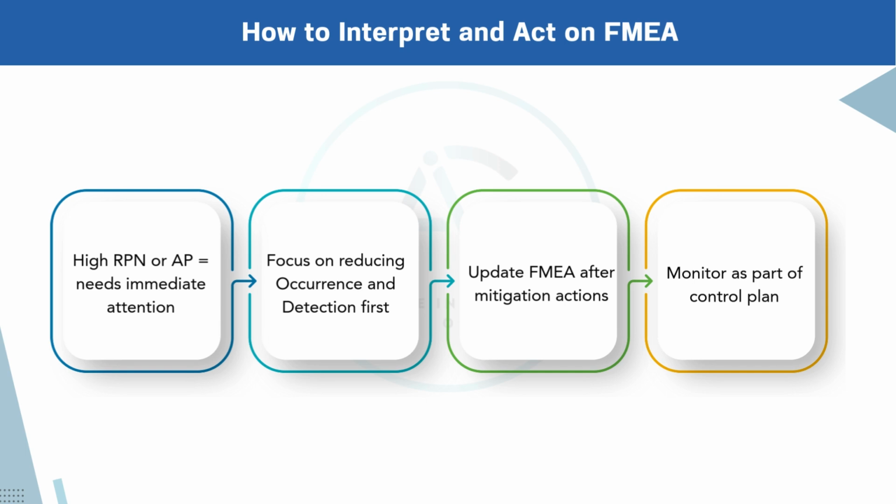Assuming perfect detection systems. This is a common overconfidence trap. Assuming that the detection systems in place, like alarms, checks, validations, will always work. In reality, no detection method is foolproof. Always assign a realistic detection score based on data, audits, and past failures.